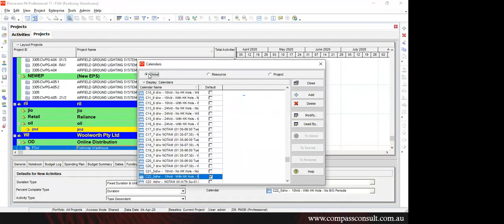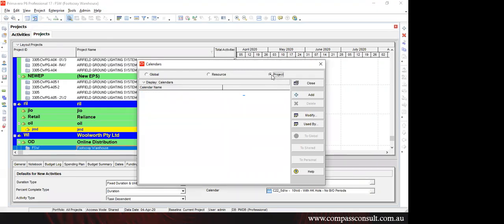In global, mostly the general calendars that people are using, like a general shift, but we will not use a global calendar for each and every project, because it's available for every project. If we use a single calendar with multiple projects, it may be difficult to manage individual timing for each project. So we always create a personal project calendar for each project.